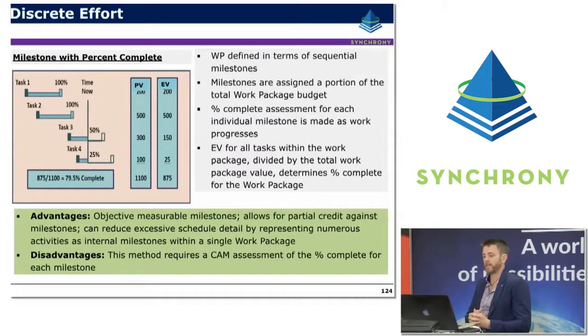Milestone percent complete. This is very similar to the last technique used. The only difference being that you actually can claim that partial credit as you're working towards each of the milestones or completion of the activities. So this might be used where the packages are a little bit bigger or a little bit more unique than the ones that you've used for the milestone technique.